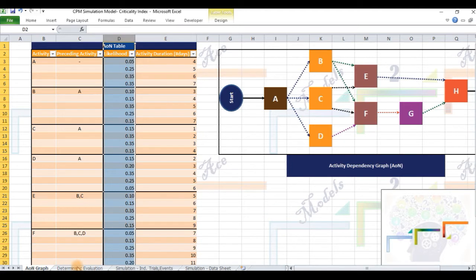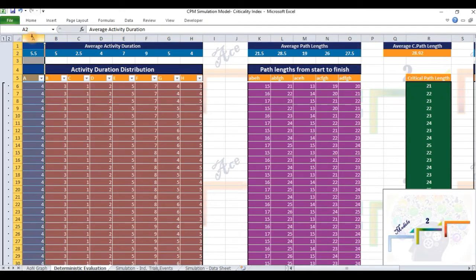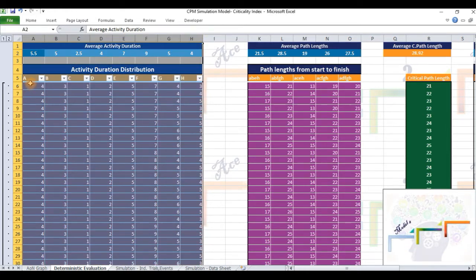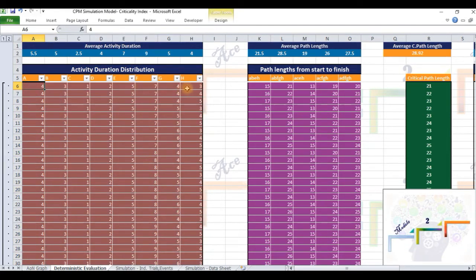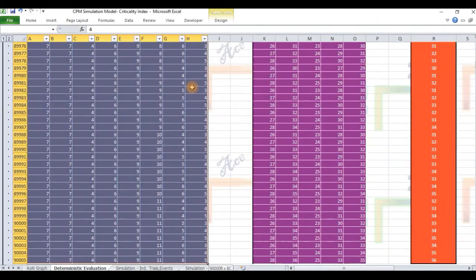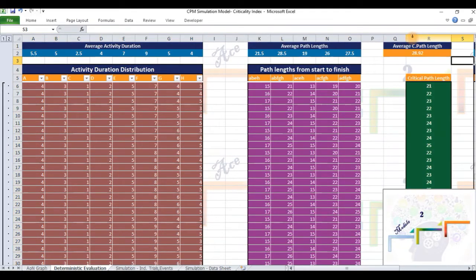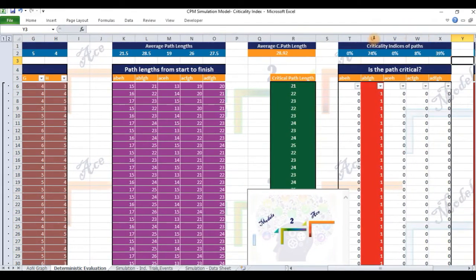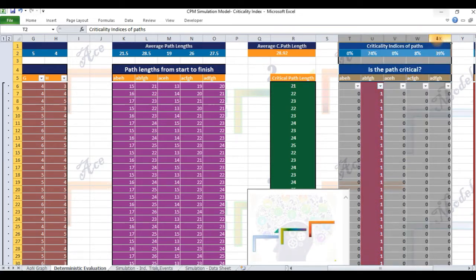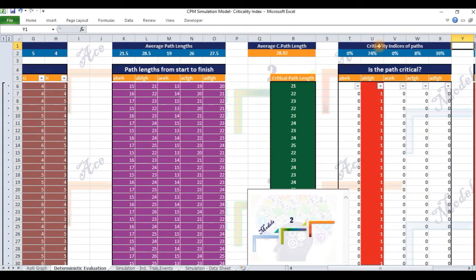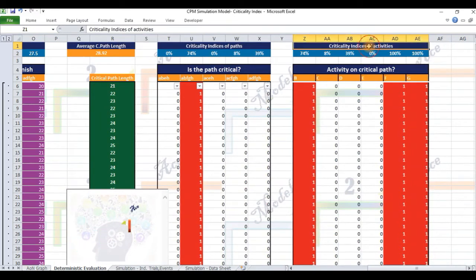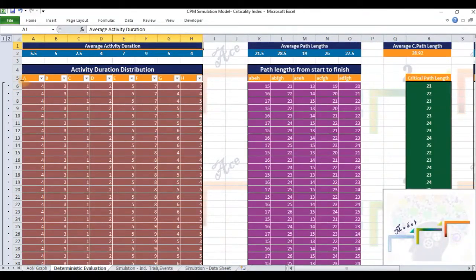In the second tab titled Deterministic Evaluation in the spreadsheet, we generate the exhaustive set of combinations of all possible values that activities A through H can last for. 90,000 possible combinations of activity values exist for those listed here. The critical path is evaluated for each member of this population of 90,000 combinations. We then derive the criticality indices of paths and activities. Clearly, this is a brute force approach and is prohibitively resource intensive.